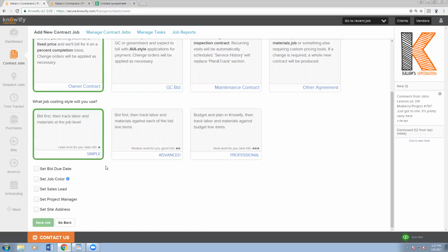It sets it up so when you are costing items to the job, there aren't multiple phases. There's one called labor and materials, and that's where you can see all of your different job costs for the project as a whole. So you don't have to jump around phase to phase. It simplifies the process. You don't get the same level of detail out of your job cost, but you can really just make everything run a little bit quicker in your system.